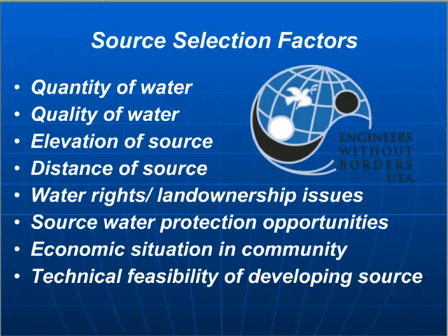I know I personally was involved with a project where supposedly the landowner had signed something saying they were okay with it, and I think had changed their mind later on and actually came out and threatened the people working on the construction of that water system when they were actually out there on their land. So land ownership is hugely important because you don't want to get down the road, all the fundraising's done, you're out ready to construct, and then there's this challenge that you can't get around and you have to cancel the project. Source water protection opportunities is also important to consider.